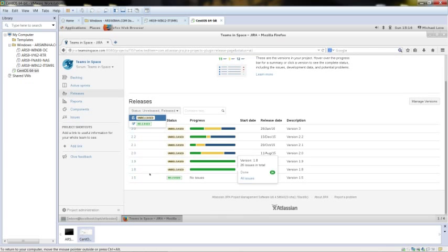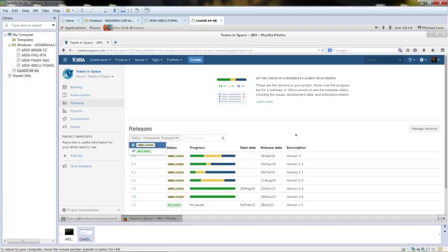All of these features that have been discussed are part of the Scrum methodology of Agile. We can also go to a Kanban board. Unlike Scrum, the Kanban teams have a continuous flow of issues across the board. There are no sprints, no set start or end dates. Kanban teams take the items off a prioritized backlog and work on them one at a time.